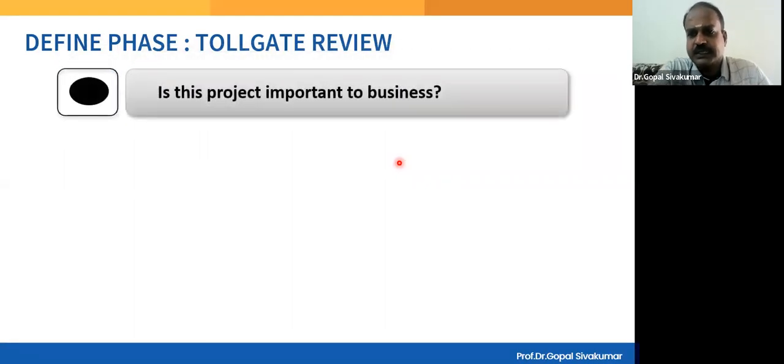The first question that gets answered in the define phase is, is this project important to the business? Of course, you have identified a project. Your project is important to you. Your project goal is important to you. But now the question is, how is this project important to the business? Because the business has got its own goals, right? The business goals, and generally they are called strategic goals. So what is the relevance of this project goal with respect to the strategic goal of the organization? That means, is there a goal alignment between what you are trying to do and what the company wants to achieve? That should be clarified.